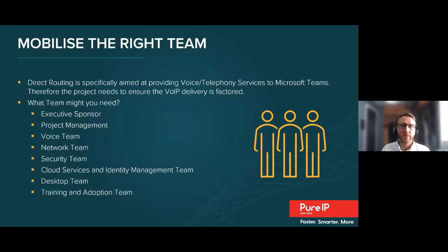Much of the key to success with direct routing is down to the planning and preparations performed, and therefore to achieve that, you need the right team on board. Project sponsors and project management are fundamental to most successful projects, but with a direct routing solution and therefore Phone System, it's critical to have the voice and network roles covered when starting to prepare. But since Teams is an integrated UC and collaboration service, you may quickly find that resources from other areas of your business are required. Those voice and network members of the team will be able to start on the initial preparations with assessments on the existing telephony system and network.